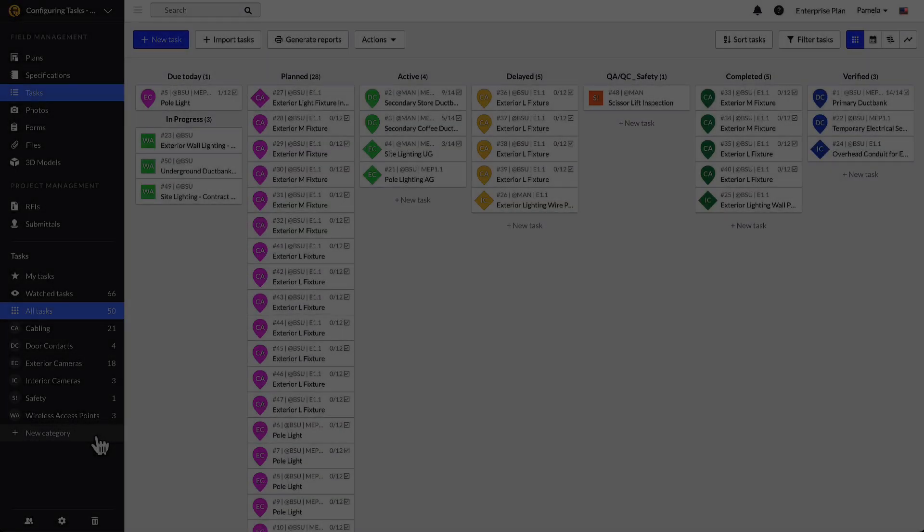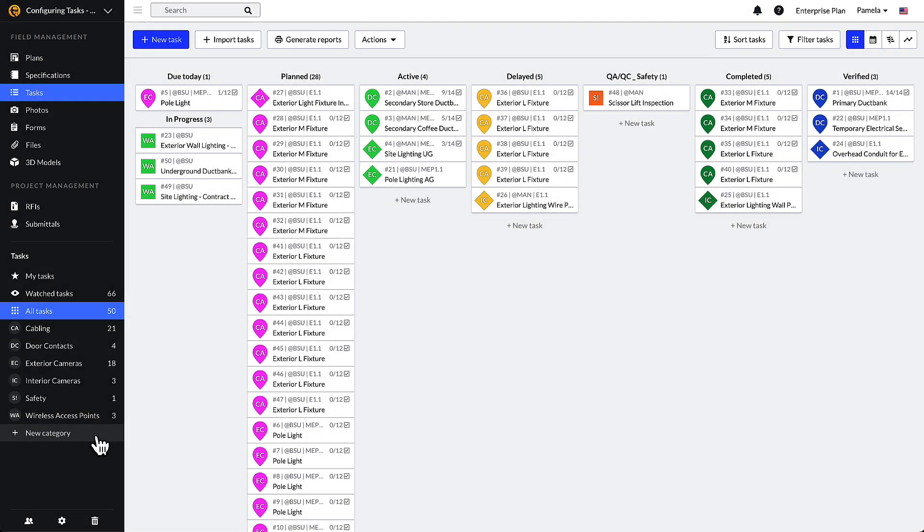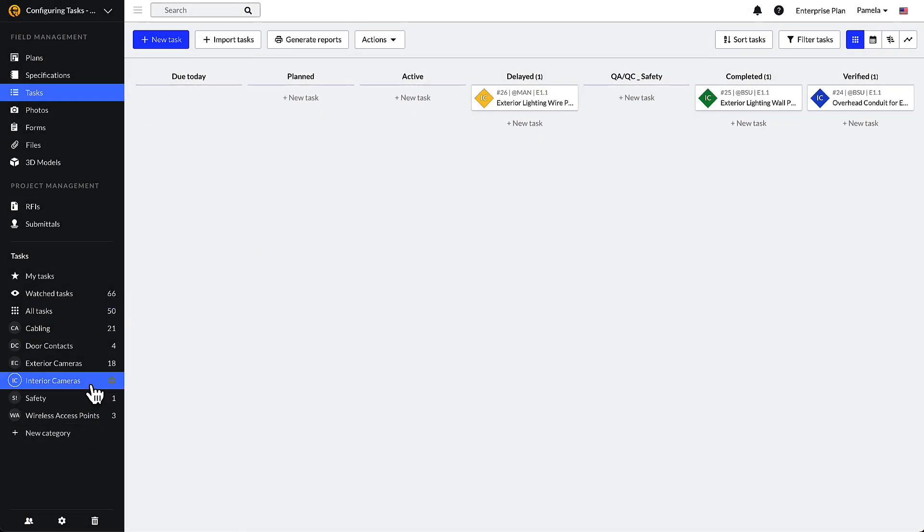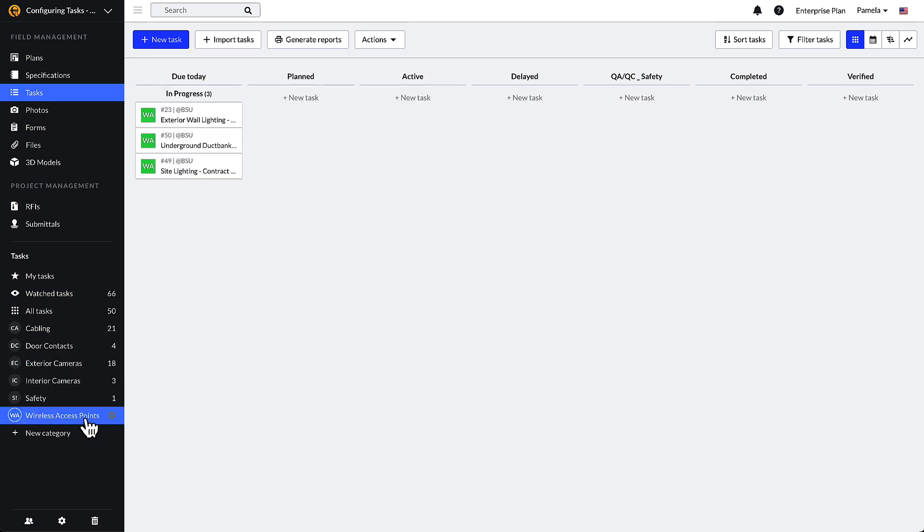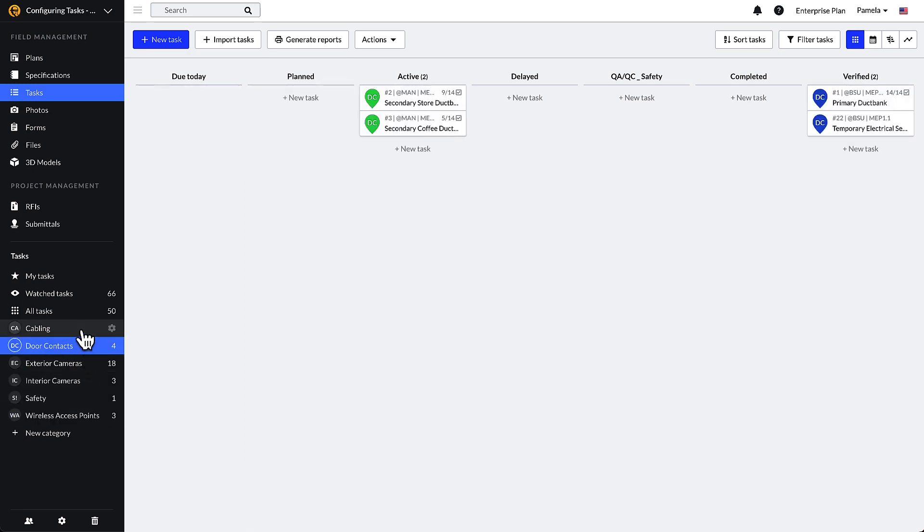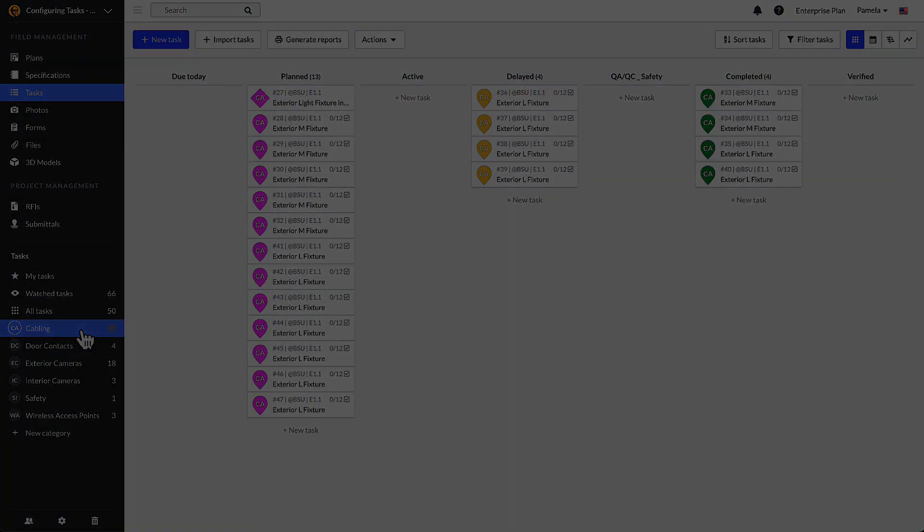If you are a low-voltage sub, you might use categories for the components of the work you install, like interior or exterior cameras, wireless access points, door contacts, cabling, etc.